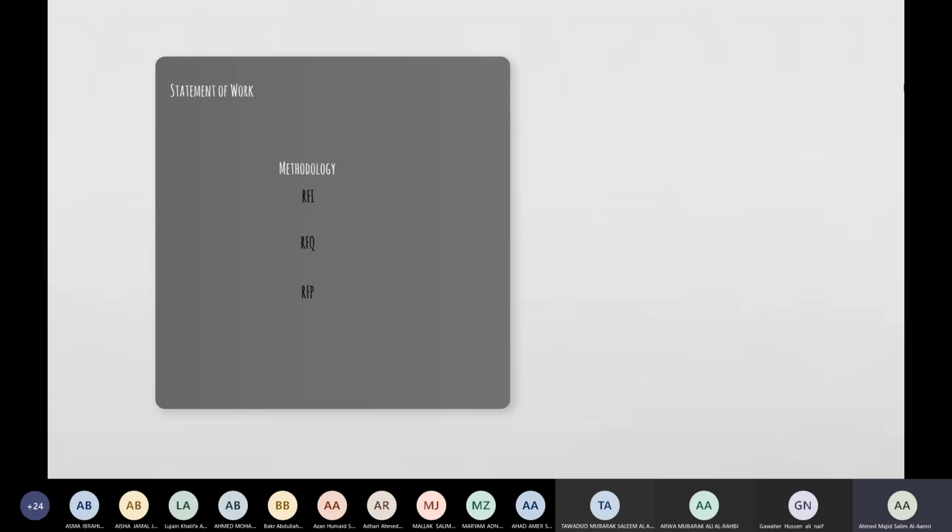If I ask the supplier the information about this particular printer, which cartridge or which ink is to be used, is it binding? Am I forced to go and purchase from him if I use request for information? Okay, so once again, the methodology of request for information, we are asking for information if it's not available with you. And in this method, there is no actual binding, there is no contract between me and the other person. I'm only asking for information.